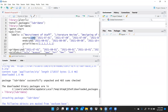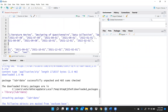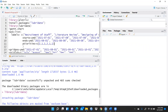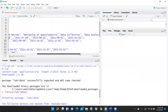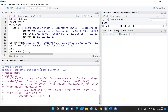The ymd format means y for year, m for month, d for day. So for example, 2021, month 7 (July), day 1 — that is when the project started. I have given all the start dates for each phase. Then for the ends, we again use the ymd function and write all those end dates. After that, priorities — using c(1, 1, 2, 1, 1) — are combined, and I close the bracket and run the complete function.